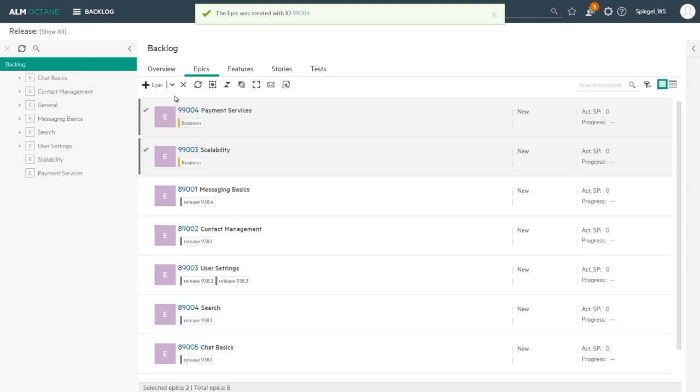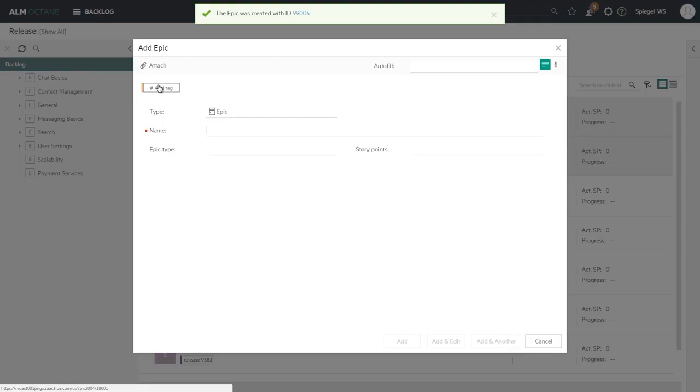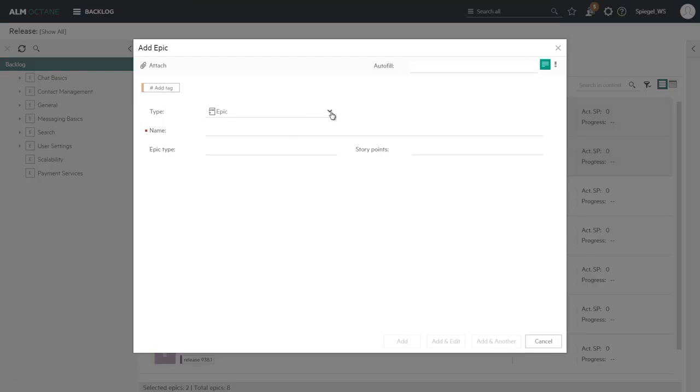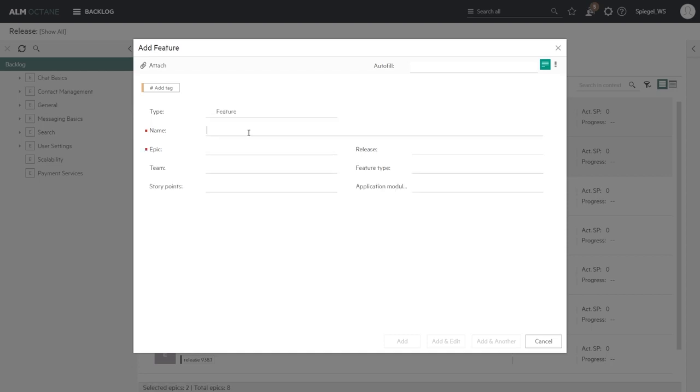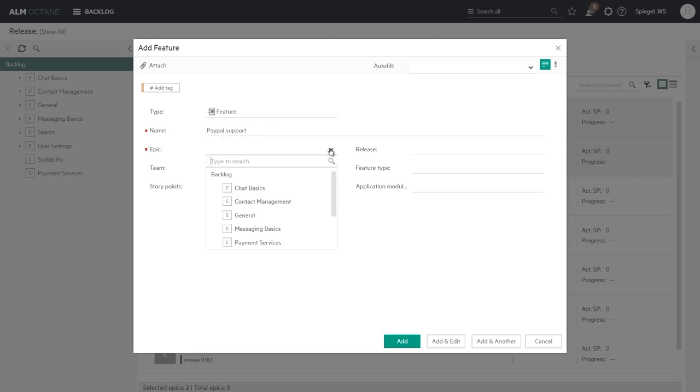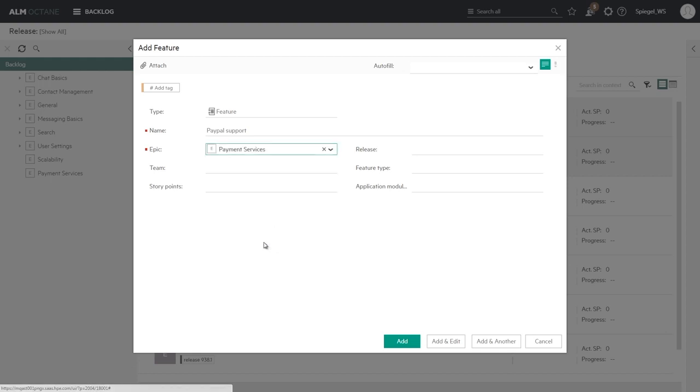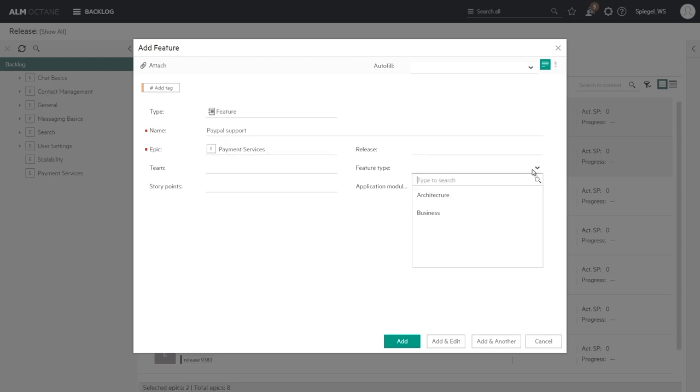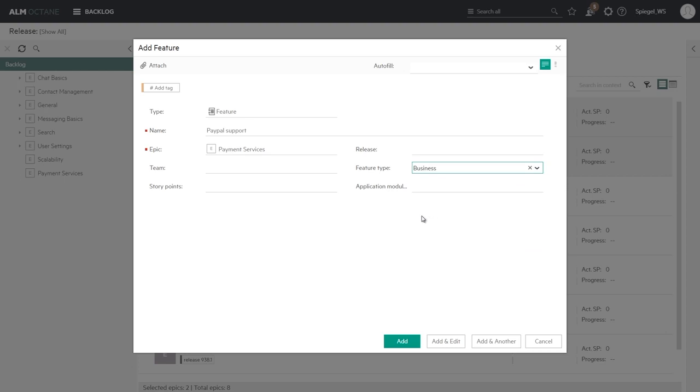We can add not just epics but also features which break down those epics. So let's have a PayPal payment support, we'll set it to relate to that epic that we've just created. We can set also that feature type to be of a business type and set the weight and effort in story points.